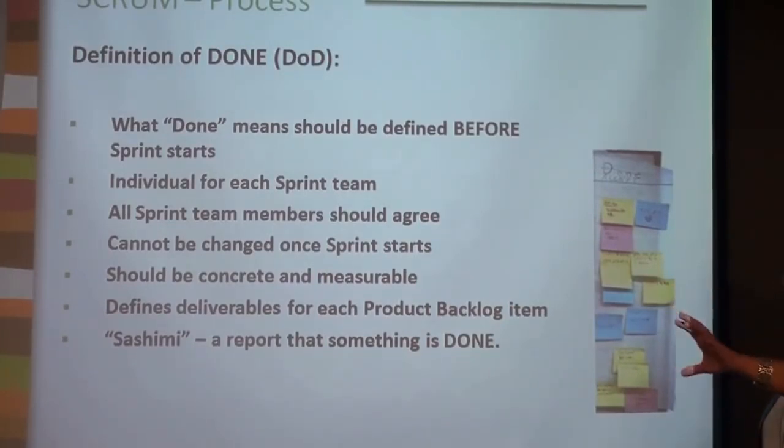towards the end of the sprint, they realize, oops, we do not have time to develop all the fields. Like, let's say we are supposed to develop 20 text fields and we only develop 10. Can we change the definition of done and pretend we did the web form? You should not do this. This is not how Scrum is run. If you did not develop all the 20 fields and only delivered 10, your sprint fails. You will do better planning in your next sprint. But you should not change the definition of done mid-flight.